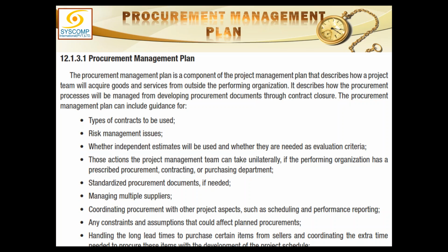We do a detailed estimate by ourselves or through a consultant, which will give us a fairly good picture how much is to be spent on this project. Now when I see the bids, I would know that somebody has quoted too high or too low. So this becomes my standard against which I measure which bids to be selected.